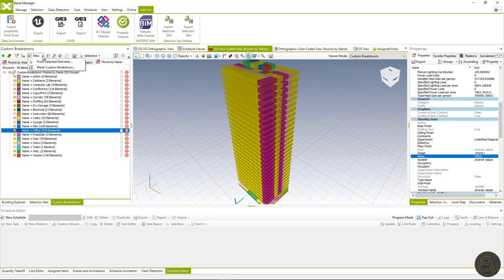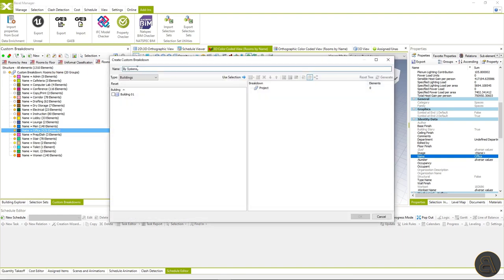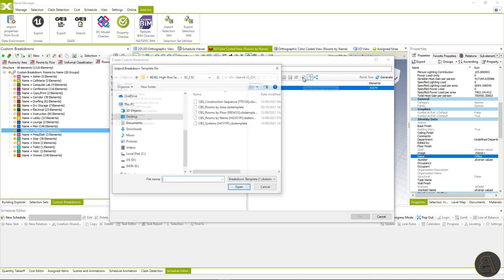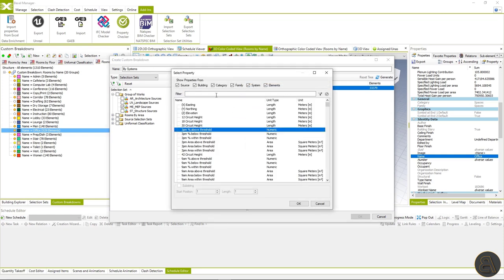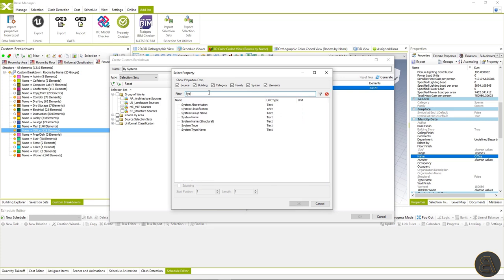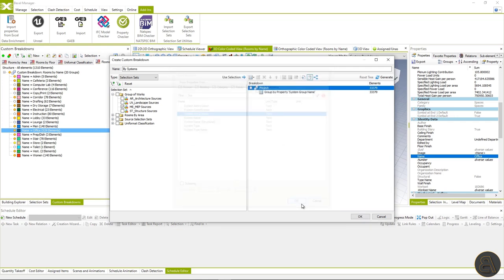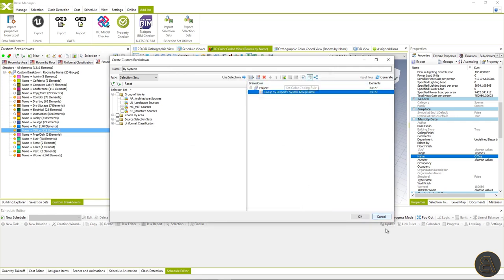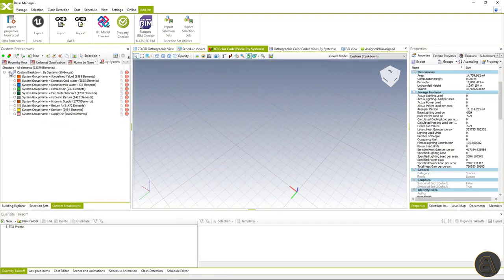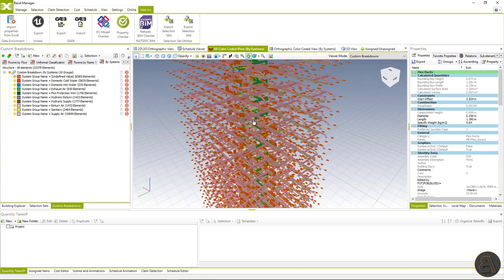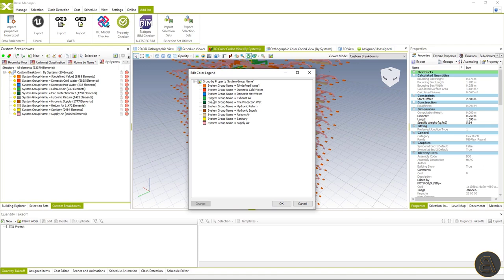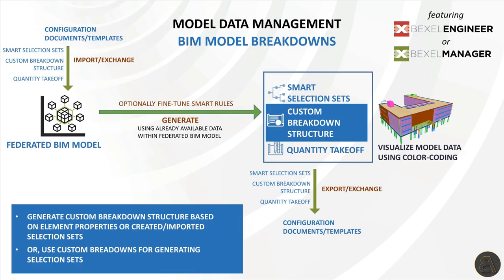Now let's create a breakdown for MEP systems. For the group of elements, I will use the MEP selection set previously imported as a template. You can use a CBS template available on the user area, or simply choose a rule from the property list and create it yourself. I will filter from the list of properties 'system group name,' set color-coded view by clicking OK, and we have sorted MEP elements according to system name. As you can see, we have a lot of elements without a defined system, colored in orange.